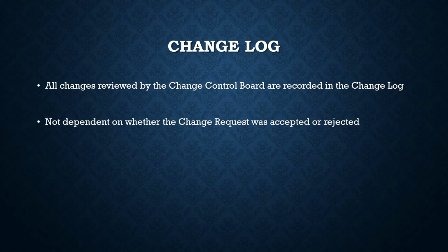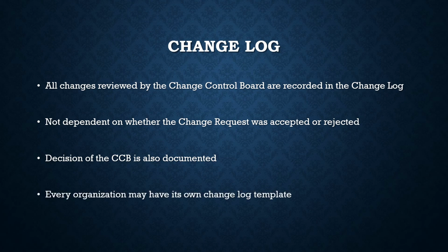This is not dependent on whether the change request was accepted or rejected. So whether your change request is accepted or rejected, nonetheless, it needs to be there in the change log. So the CCB decision, whether the change request was accepted or rejected, goes into the change log. And every organization may have its own change log template, right? So there's no universal change log template. Every organization may have its own.